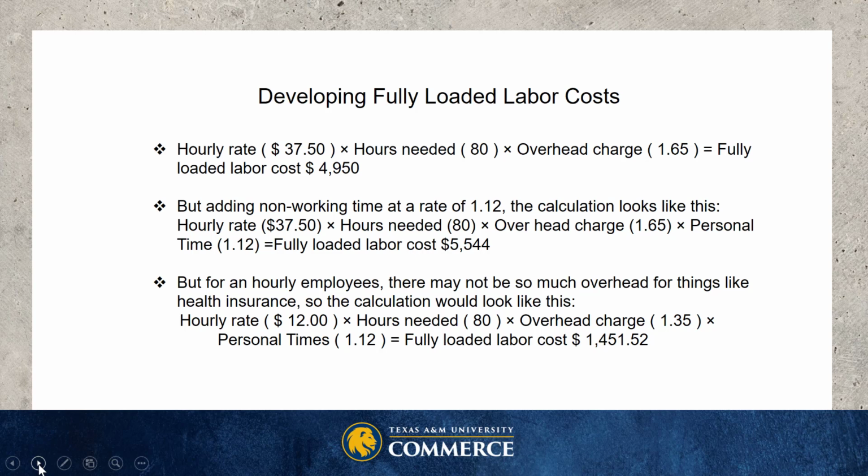We're going to need that person for 80 hours, and we have an overhead charge of 65%, which is health insurance and other insurances and other benefits that that employee has. And that's going to give us a fully loaded labor cost of $49.50.